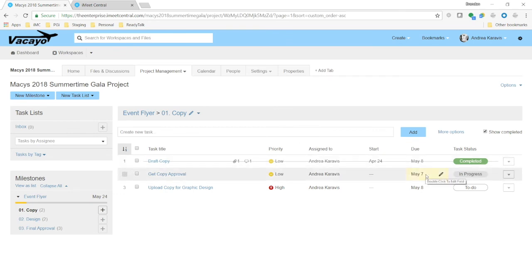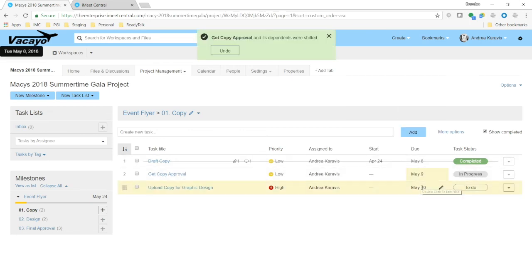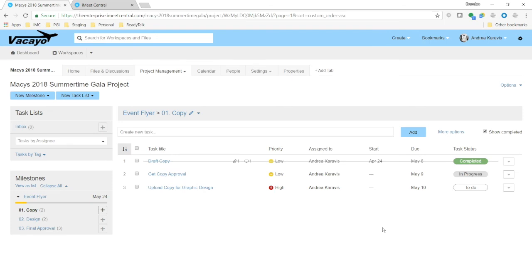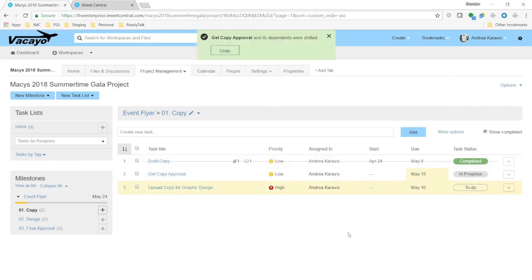to these dates. Now, if I have a task dependency between this task, and I change this date here, so I change it from May 7th to May 9th, it automatically updates my dependent task. Remember, I created that dependency in the Gantt chart. That's pretty cool. And your team is going to love you for configuring it, because they go, oh, cool, I don't need to update all of my tasks. I just change one, and it changes the other one. Hooray!